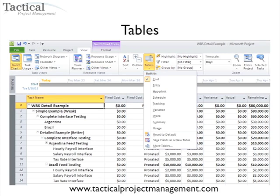In this slide, I'm showing you how to access one of the tables by going into the View menu item of the ribbon bar and clicking on Tables. Here I can access the cost table, which gives cost information about the project. Typically when you start working with Microsoft Project you're using the entry view, but by switching through the different tables, you can access a whole bunch of underlying project data to make better project decisions.